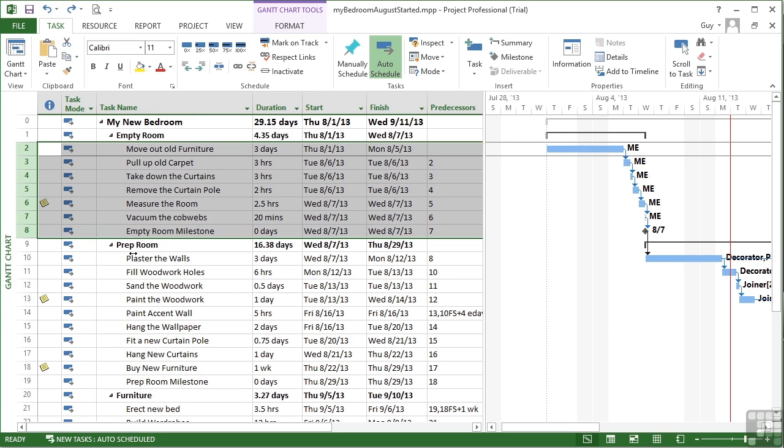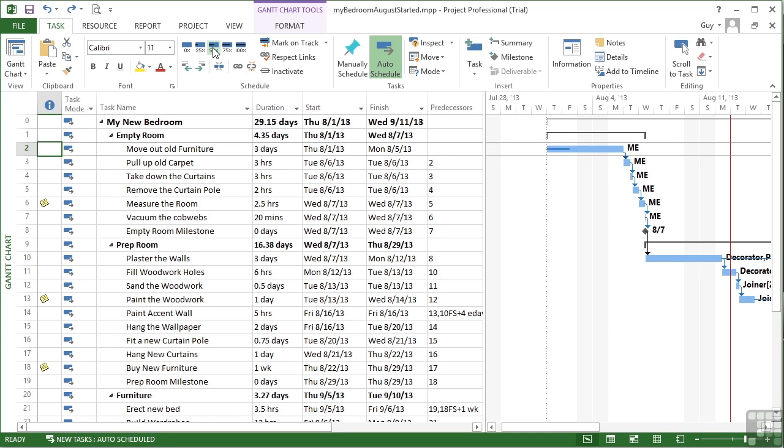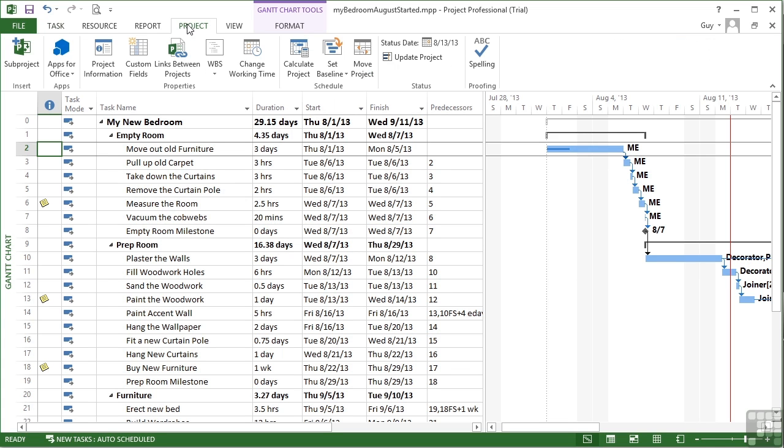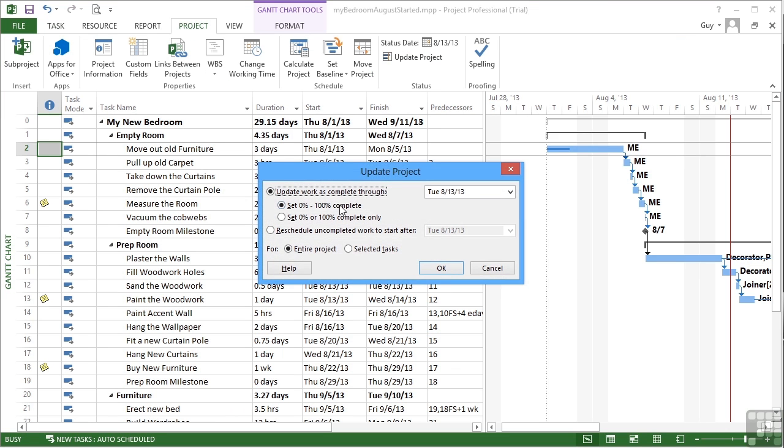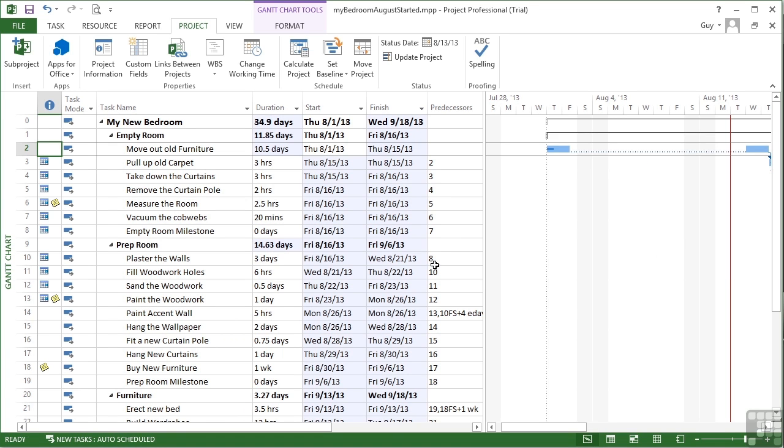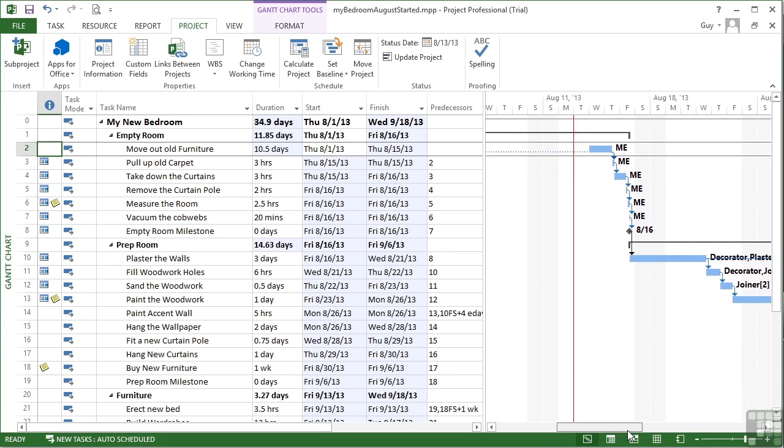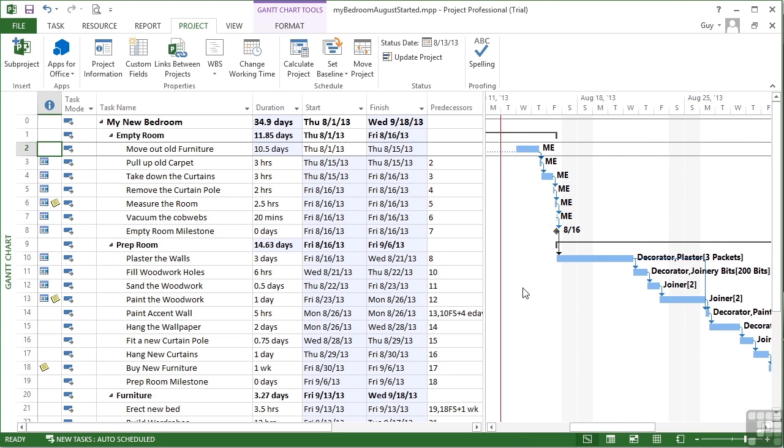Now what happens if we've got to this date here and we aren't on track? Move old furniture, we've done half of, and that's all. So when we come to the project, update project, I can't mark them all as complete because they haven't even been started yet. What I need to do is reschedule uncompleted work to start after the day we're currently on. OK, the task that was part done gets split. Everything else gets moved on and therefore there's a consequential knock on effect to the whole project.